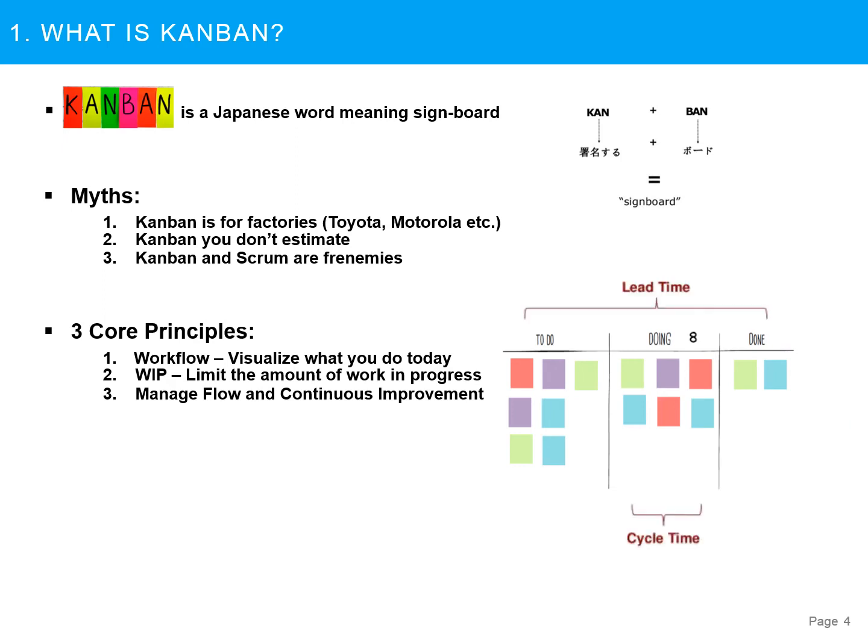Lead time and cycle time are widely used terms in the world of Kanban, and these are the two metrics that I'm going to discuss in the later part of this tutorial as well. So what is lead time? Lead time is the complete process. How long it takes for an idea to get into production. And the focus for us is to minimize the lead time. Cycle time, on the other hand, is only part of the process. How long does it take to develop this feature, or how long does it take to test this feature?